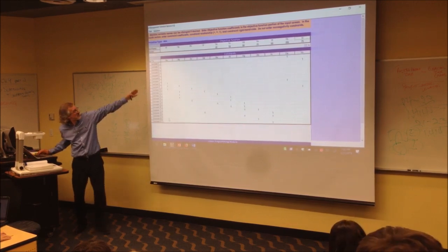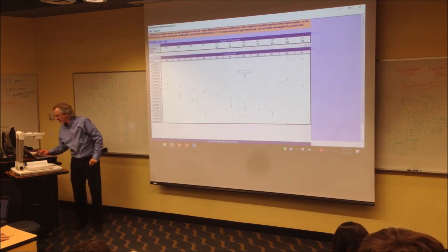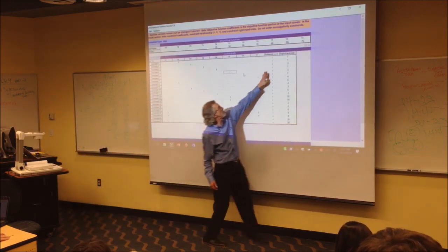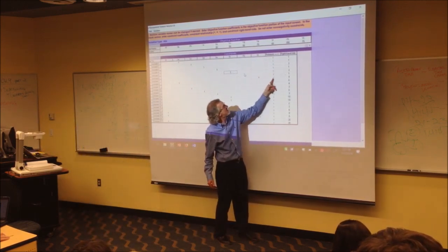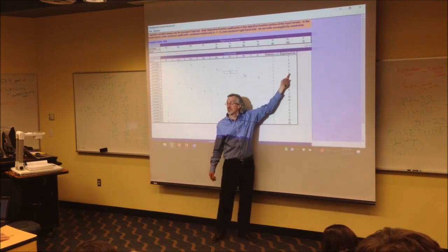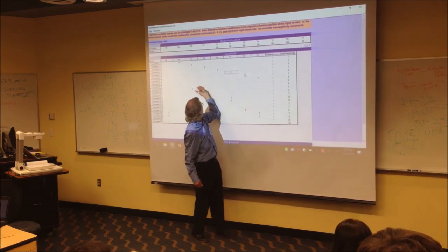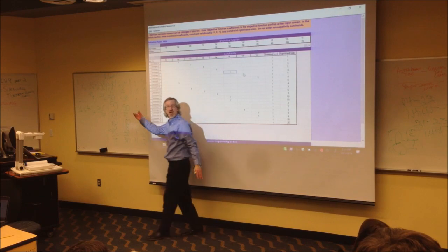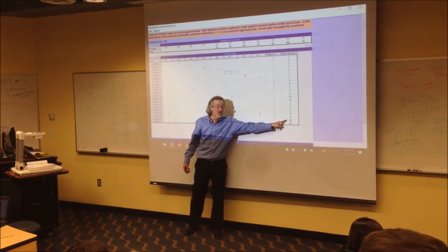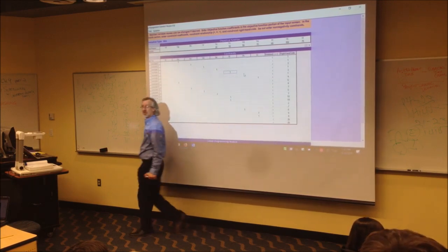Now down here, these are all the constraints. These are all those constraints. Here's all your y constraints. Y sub I less than or equal to 4. Y sub f less than or equal to 3. There's the y constraints. Here's your x constraints for the activities. Your 1s and -1s will be across there after you apply the algebra. And then these two are those last two activities that go to the end that have to be set to less than or equal to whatever it is you're crashing to.